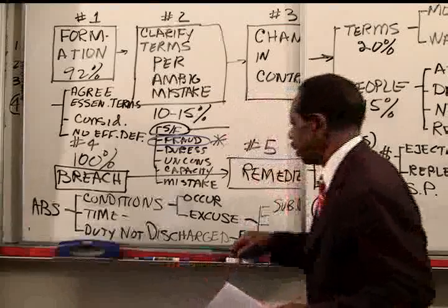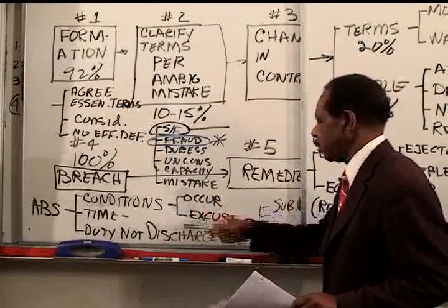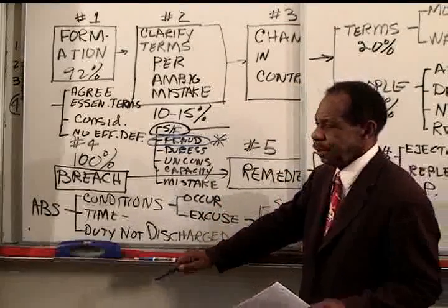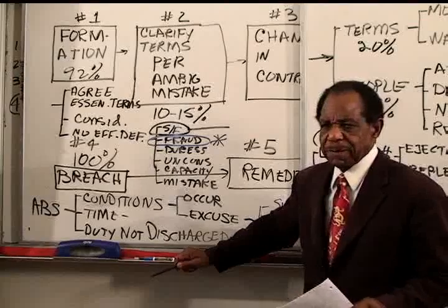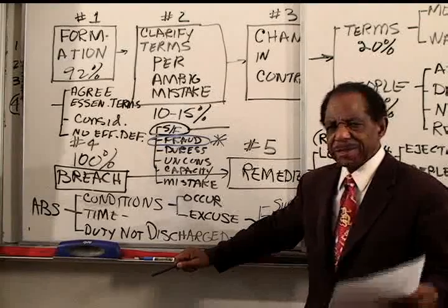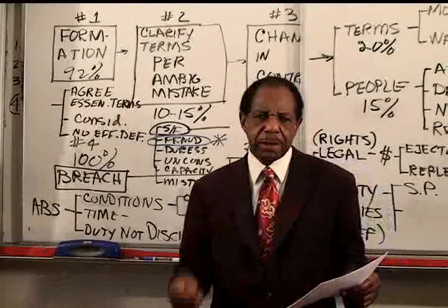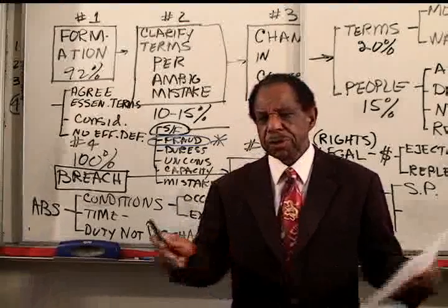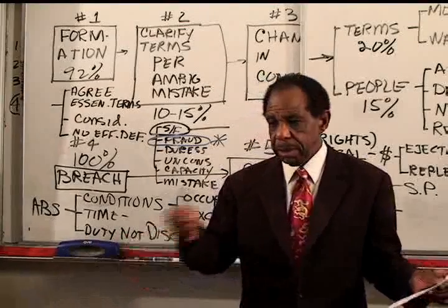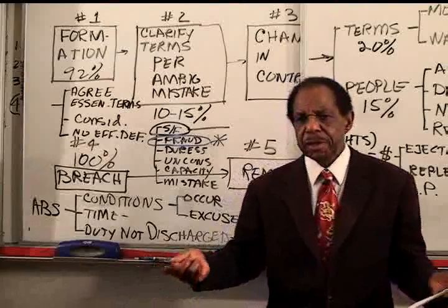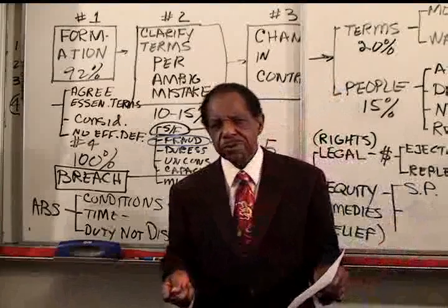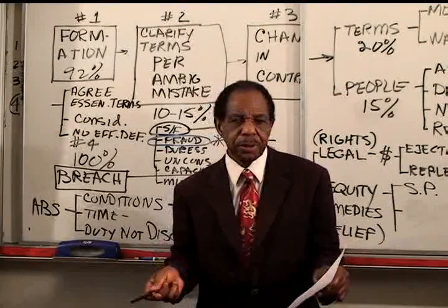And so when we come to the breach, the question is going to be, how closely do the shingles have to match when the contract said matched? And the answer to that is going to be that when you use the term matched in an industrial contract like this, then the industry's use of the term matched is what will be used.